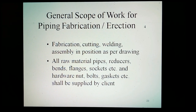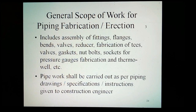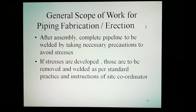General scope of work for piping fabrication and erection. Fabrication includes cutting, welding, and assembly in position as per drawing. All materials — pipe, reducers, bends, flanges, sockets, etc. — and hardware such as nuts, bolts, and gaskets shall be supplied by the client. Fitment includes assembly of fittings such as flanges, bends, valves, and reducers; fabrication of tees; fitment of non-return valves, gaskets, sockets, pressure gauges, and thermal elements. Pipe work shall be carried out as per piping drawings, specifications, and instructions given to the construction engineer. After assembly, the complete pipeline is to be welded with necessary precautions to avoid stresses. Any stresses developed are to be removed and welded as per standard practice and instructions of the site coordinator.